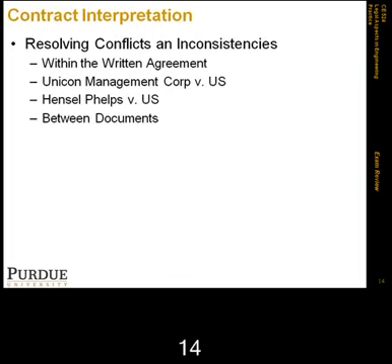The first is, for example, which one should be included, which one should be given higher precedence. There are so many. The precedence of documents clause will not deal with problems of evidence for low-ranked documents, for example. What happens if we mess up and choose the wrong documents to have high precedence? So that's why we should probably avoid including a precedence of documents clause in general.